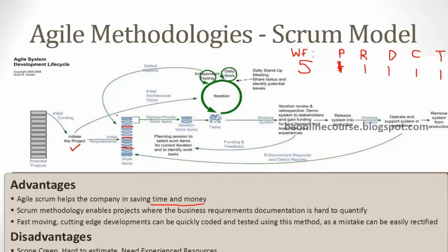Now what Agile would do is it will not capture the complete requirements into the BRD, which we have done and created a BRD here. So it's not capturing all the requirements, because all of them are not important for me. So what I would do is I just pick up the top most important ones. The top 4 or 5 requirements I'll pick up and then go through the complete iteration of requirements, design, development, and testing. We call this a sprint.